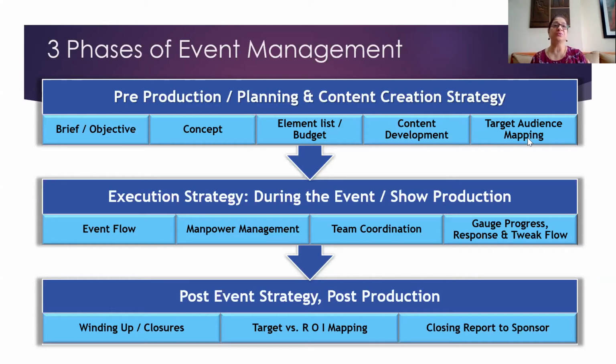So how are you going to do it? The planning process for a marathon is a good 4 to 6 months. The advertising, creating the hype of the event itself, starts 3 months in advance. So we have our media plan in place and all the ads coming out. Now, this is a hypothetical example for one event. You can hold it good for other events.